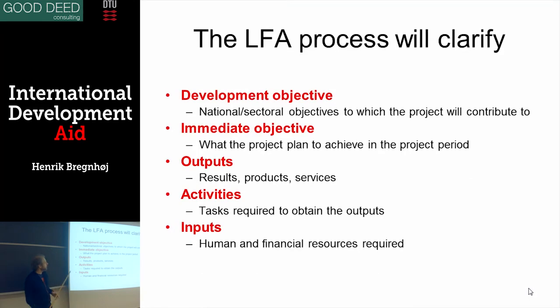So, these are the main headings in a logical framework approach. When you do it yourself or with the stakeholders, you will find out what the development objective is. The development objective is not obtained within the period of a project, but it's something that is overall for your project. It could be that there are some objectives, here it says national sectoral objectives, which the project will contribute to. Let's say you want everybody to have access to water. That could be your overall objective, but you're working with something a little bit more limited because you don't have the whole country. You're only working in one village.